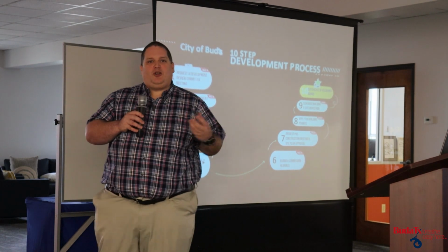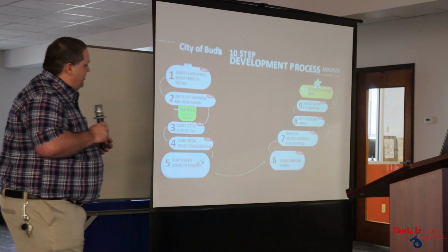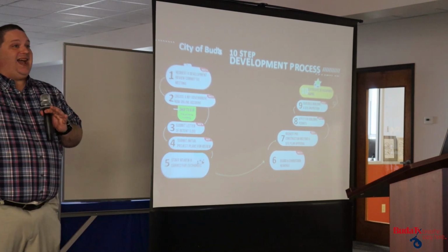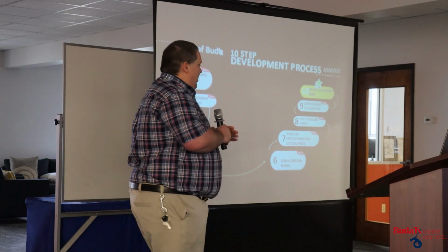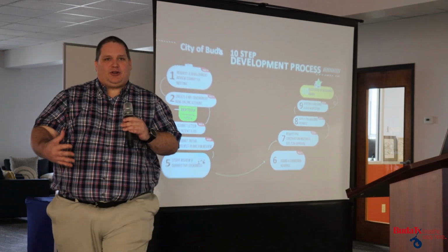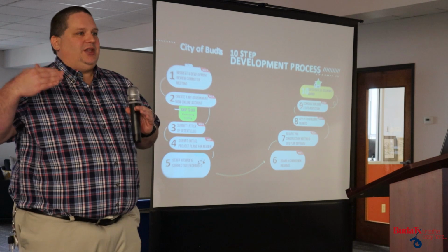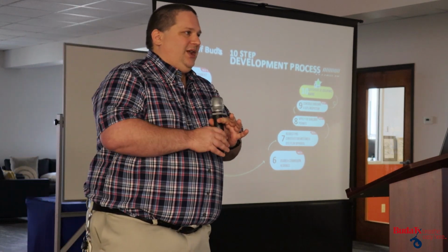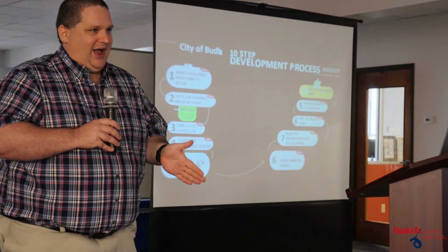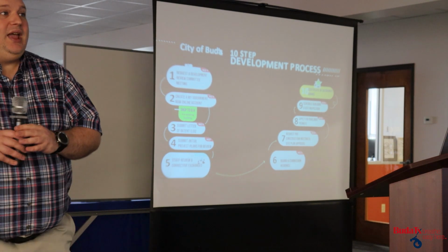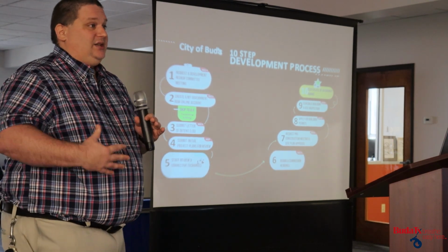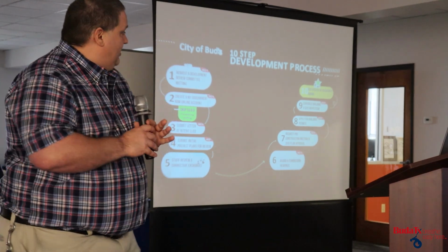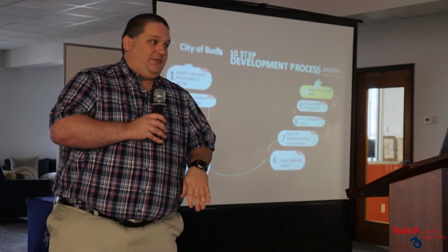Then after you have all of your approvals, for the site development, you're going to request what's called a pre-construction meeting, where we just get the contractors, the engineers, the city staff, all together in one meeting to talk about, okay, we're about to break ground, this is the process. And after that meeting, you can have your plans officially signed. And then you're ready to move forward.